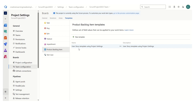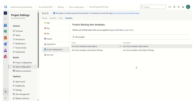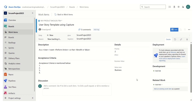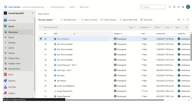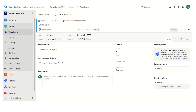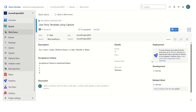If I refresh, you can see we have defined a template for the product backlog item using two flows — one using the project settings with the new template option, and another using the capture. Both are defined here. If we have to edit any one of them, we come here and do the edit. Now let's see how we can use the new work item — product backlog item — using the one we defined with capture.